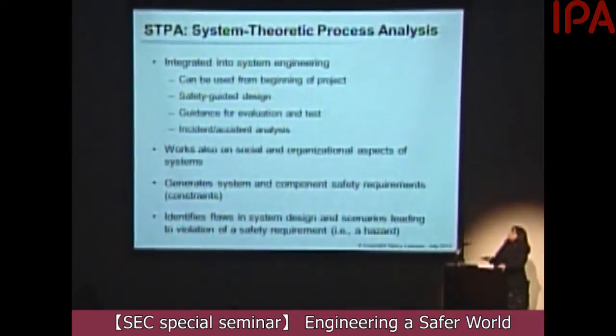So what is STPA? It stands for System-Theoretic Process Analysis. The good news and the advantage of it is it can be integrated into system engineering, so it can be used from the very beginning of a project. It can be used to guide the design. We all know the most expensive thing is redoing things after they've already been done. At the beginning, it costs almost nothing to make good decisions. It costs an enormous amount to undo bad decisions. So if we can build safety in from the beginning, it costs almost nothing to make our systems safer.